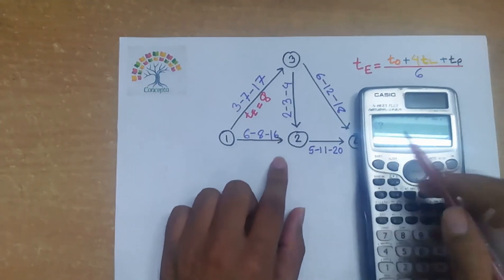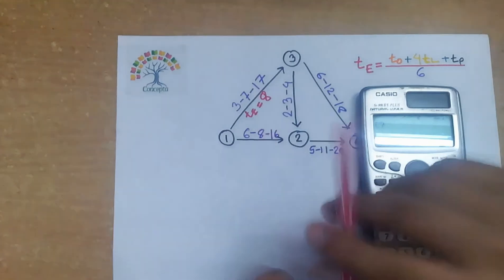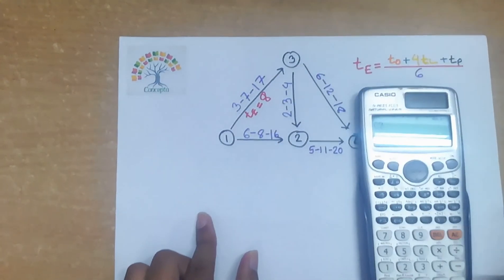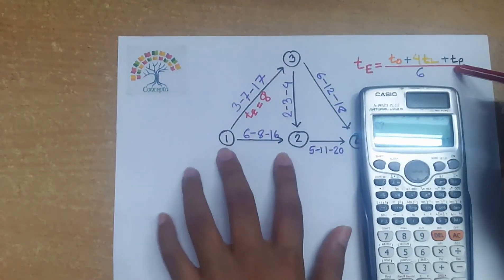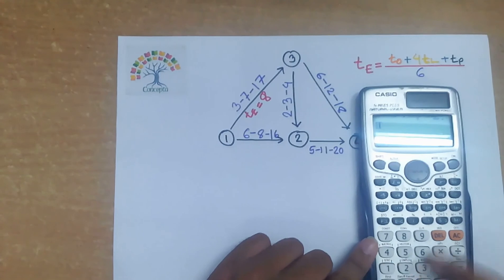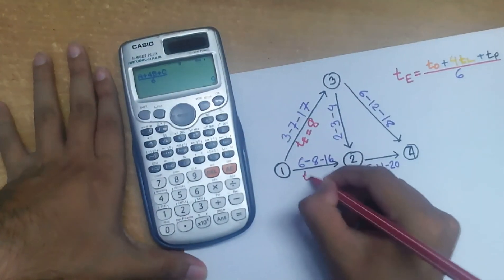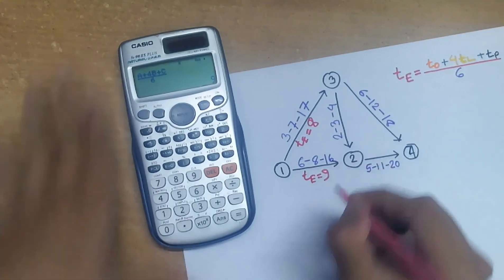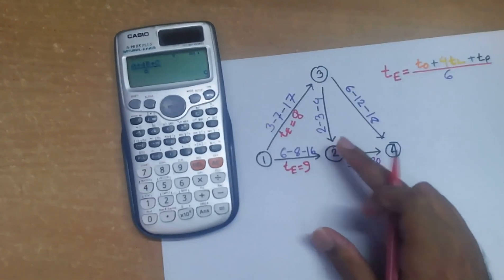And again here we will see in the calculator screen c for 17. This 17 is the value of tp of the previous path 1-3, so this is not a matter of concern for us. You will put your individual value of t0, tl, tp for a particular path. So here in our path 1-2, c is 16. So we'll put 16. Then put equal. Then comes the expected time of path 1-2. So you will write te equals to 9.